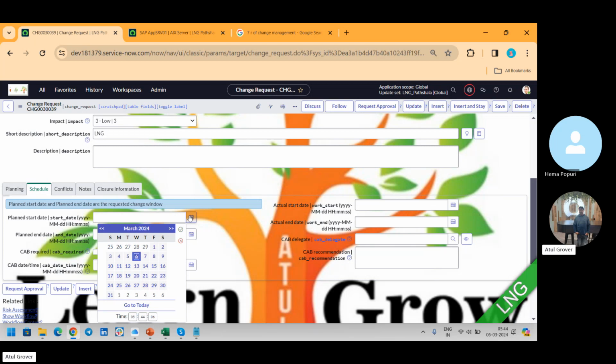But if the fire brigade comes and asks, okay, tell me how this happened, how many people are here and so on, they will ask these questions later on. The first task the fire brigade has is to overcome this fire as quickly as possible. That is the reason in emergency changes we can go with the back date, because doing the work first is important. We will do the recording later, the records will be generated afterwards.